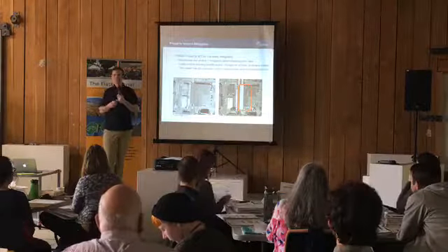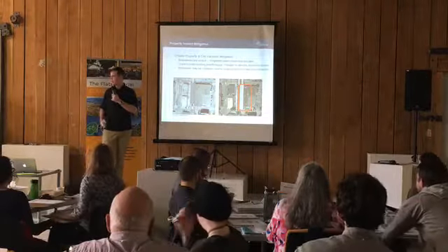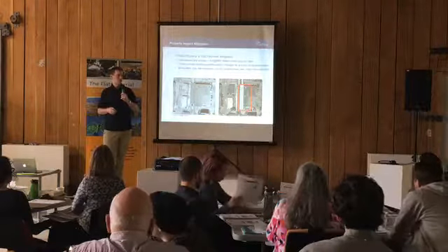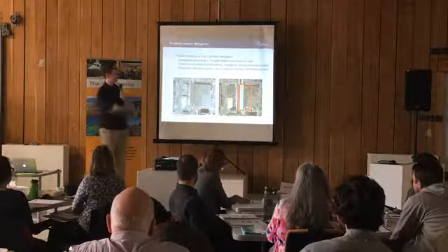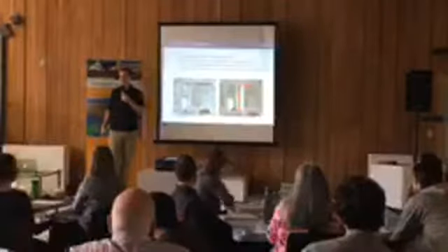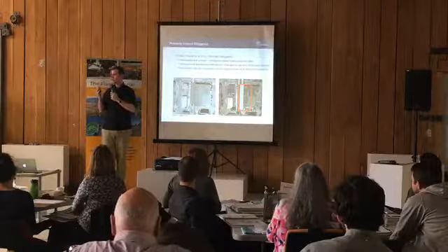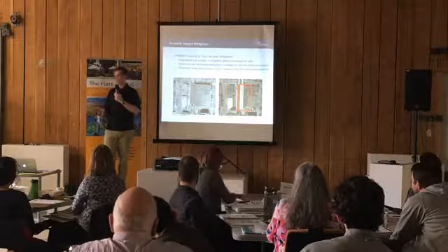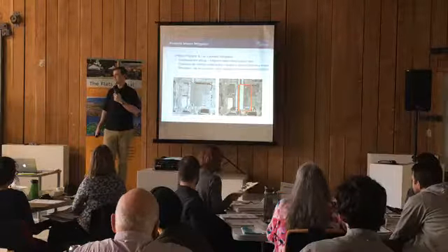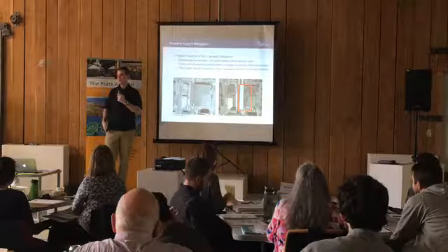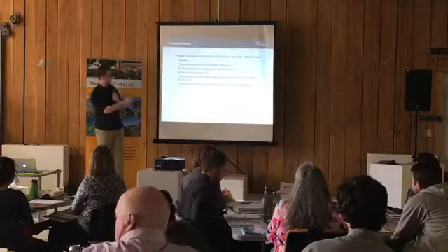In some cases, where property is partially required but not the full site, that may require building modifications or other changes in order to maintain the functionality of the remaining parcel of property. An example of this is the Commercial-Broadway SkyTrain station, which if anyone's been there recently, you may have noticed a lot of construction where the back end of the Safeway has been removed to make space for a new platform. That's an example of a building modification, and the loading bay for that site was also renovated to allow produce deliveries to still happen while providing space for the additional SkyTrain station infrastructure.